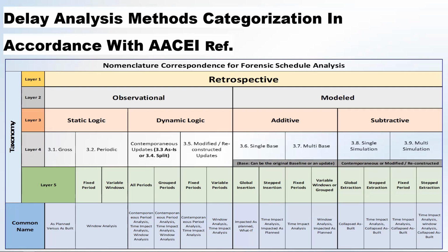So you have either the observational option. If you go for observational, you will know that we are not using fragments. We are either using a simpler representation that does not require P6 or any scheduling tool in the first place, or we are using the updates to represent the change in critical path without looking for a fragment that will be plugged into the model of the schedule.